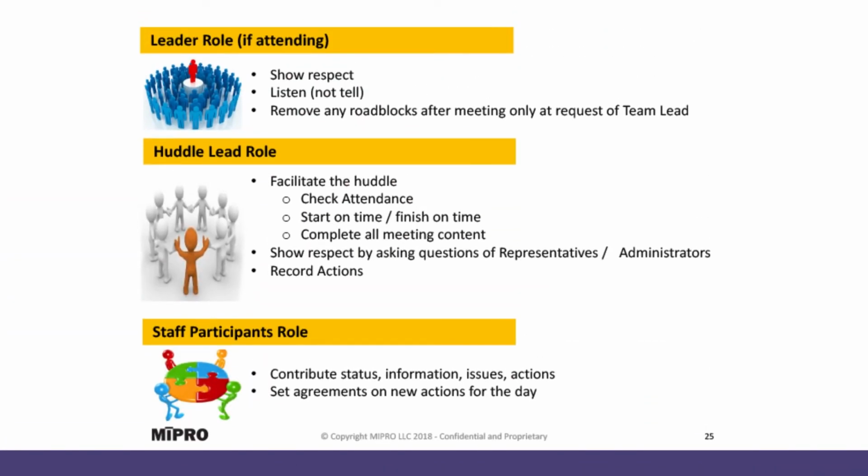The roles in the huddle are the huddle lead, whoever that is. If it's your board, it's you, and you're huddling with your team. You facilitate it, you make sure you start and stop on time, you complete all the content that we showed previously or some level of that, show respect by asking questions, and record actions. The participants, your team members, are contributing the status, information, issues, actions, and setting agreements about what they're going to do for the day, the week, or the month, whatever the time frame is.